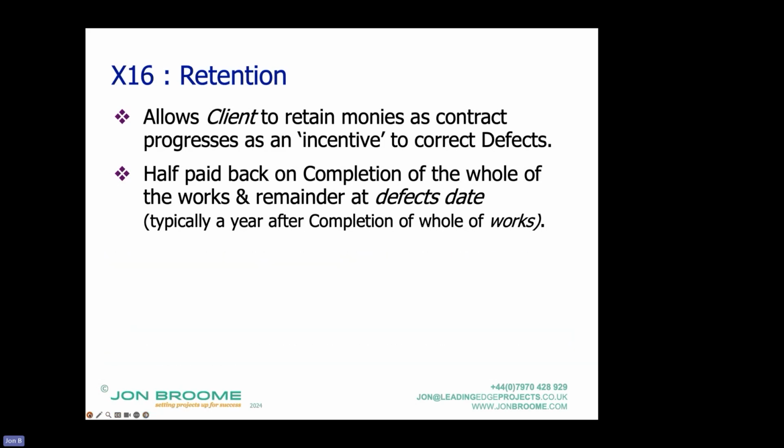Many repeat order clients aren't specifying retention anymore, on the basis that the biggest incentive to a contractor is repeat order profitable work. And notice the profitable in there. It's not repeat order unprofitable work. So you need to be a decent client, if you like. On average, contractors need to be making profit on your work. Repeat order is the biggest incentive, and therefore they don't use retention anymore.